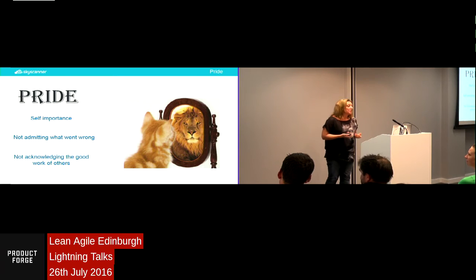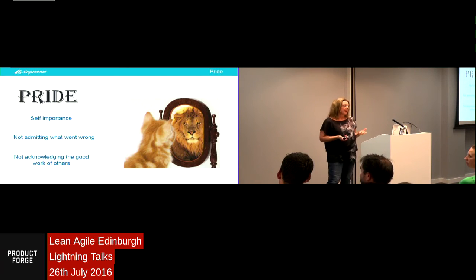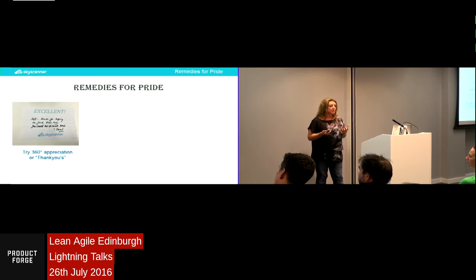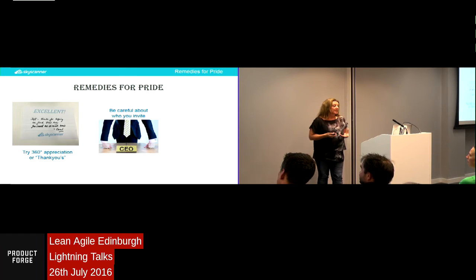The other one is just think about who you're going to invite to the retro. I've found if you have line managers in there or perhaps the CEO, people are probably going to hold back just a little bit. They're not going to get things out there. And then the other one is skillful facilitation. As a facilitator, you're going to notice if somebody's really dominating the conversation. So try to make sure that everyone gets a chance to speak and that you're able to point out in a neutral way if somebody's got that self-importance going on.